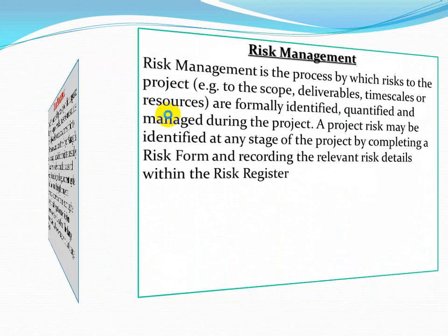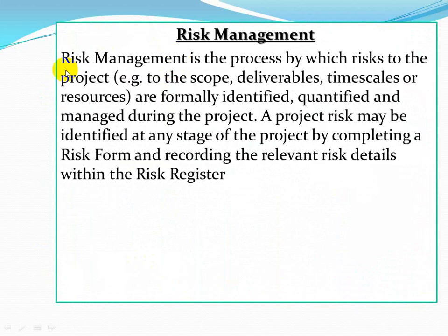इसके बाद जो है वो है रिस्क मैनेजमेंट. Risk management is the process by which the risks to the project, that is the scope, deliverables, timescale, and resources, are formally identified, quantified, and managed during the project. A project risk may be identified at any stage of the project by completing a risk form and recording the relevant risk detail within the risk register.